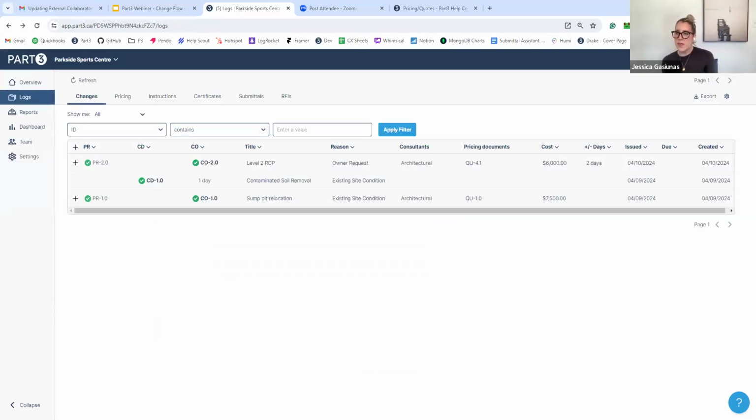For sure. We've got a question from Jennifer: for contractors using Procore, will Part 3 easily coordinate with Procore? The contractors we work with typically upload their information to Procore for their subs. For a Procore-connected project in Part 3, we pull in and can speak to submittals and RFIs only. We don't have an integration via Procore for any other document types. So whether or not you're a Procore-connected project, this change flow looks exactly the same. Only submittals and RFIs come in and speak between Procore and Part 3, not any quotes or any other document types that they might have.